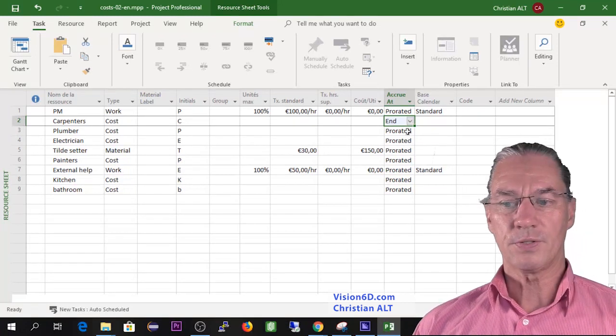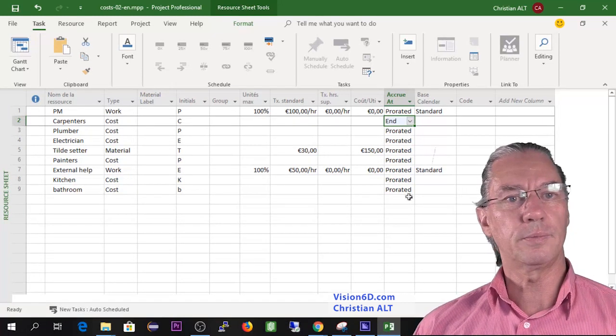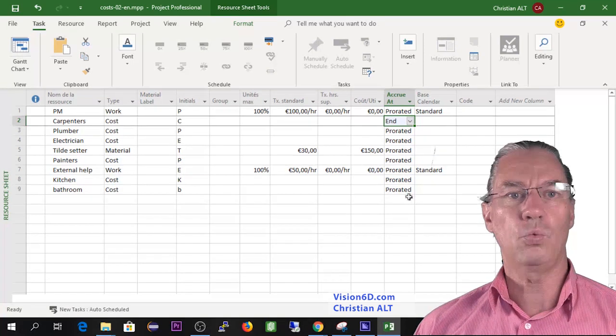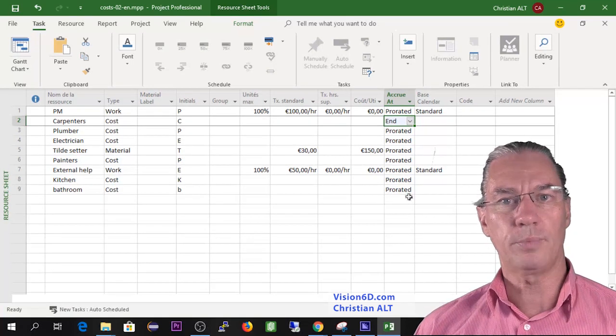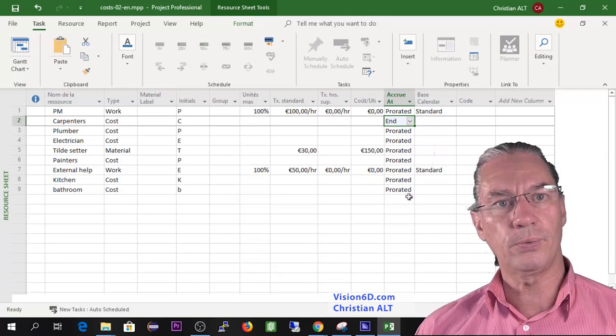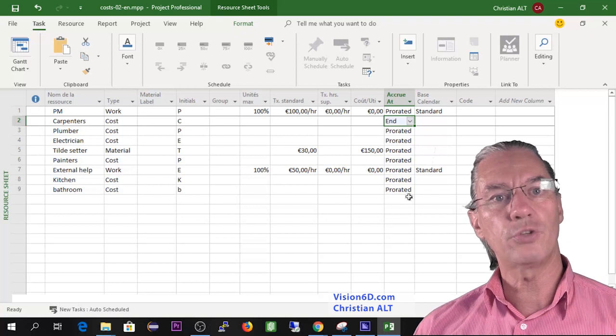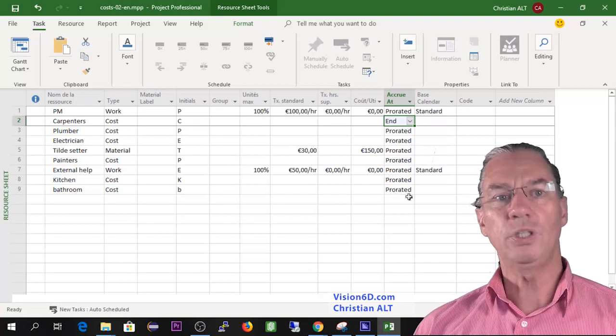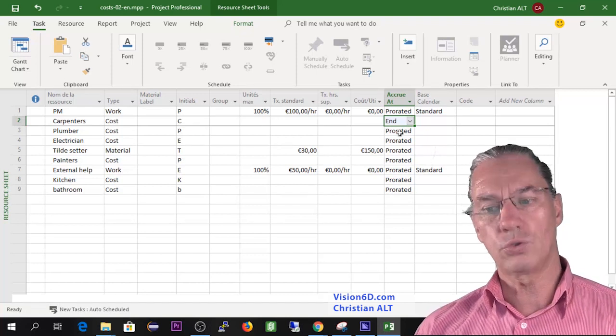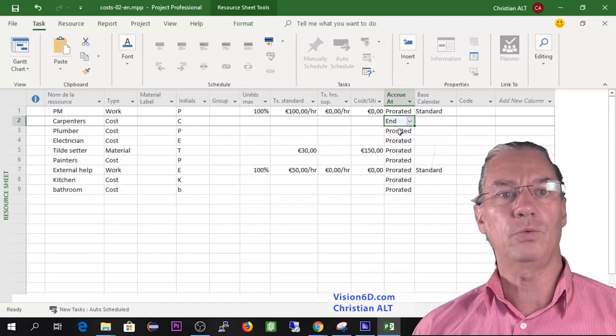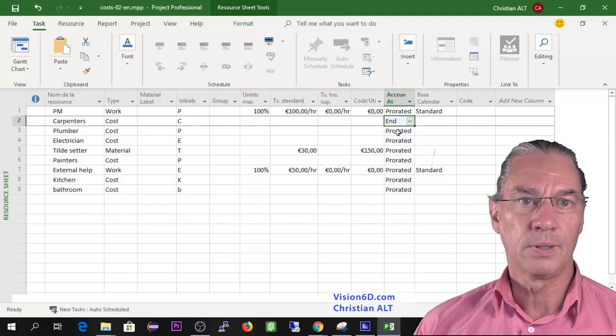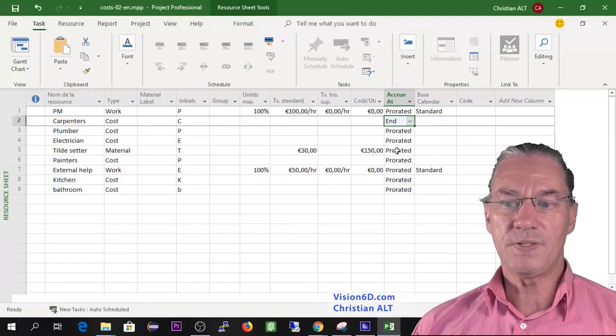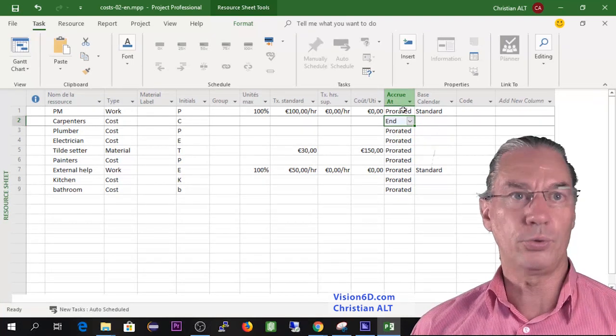So this is really important because when you are going to talk about the cash flow needed into the project, you need to know when you need to have which amount. So this is it about accrual.